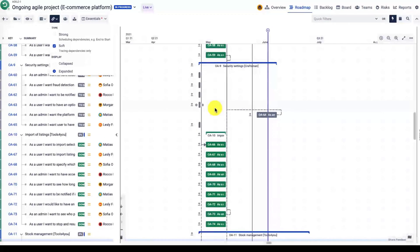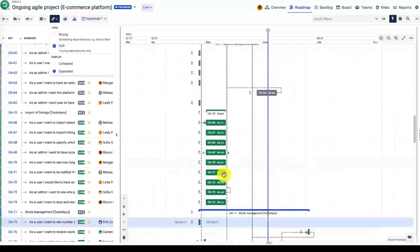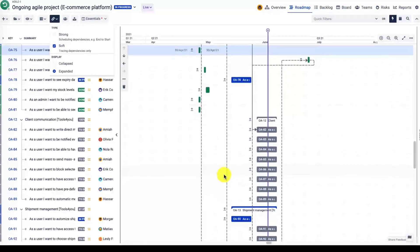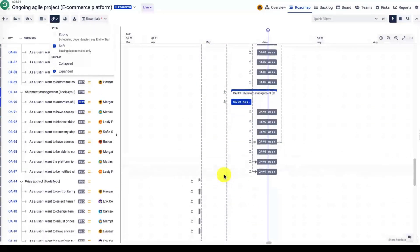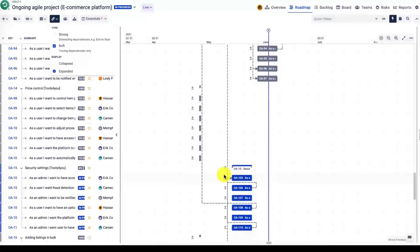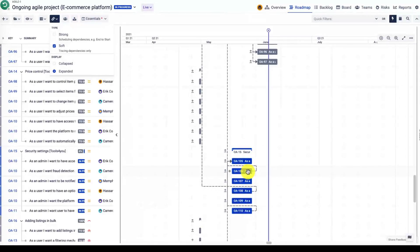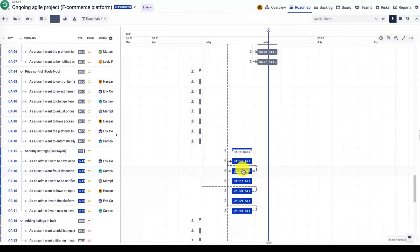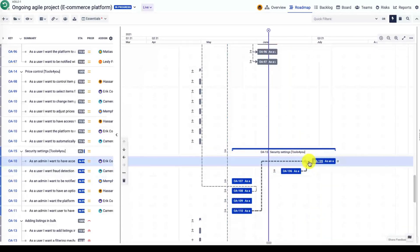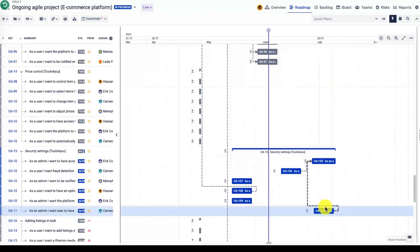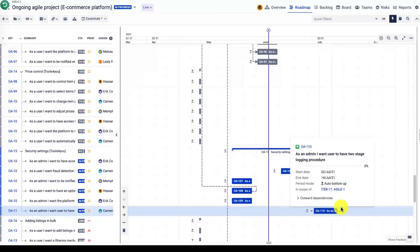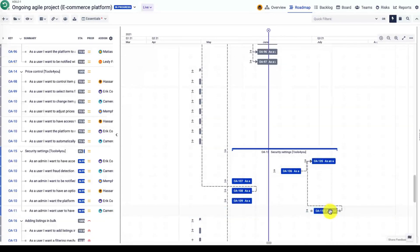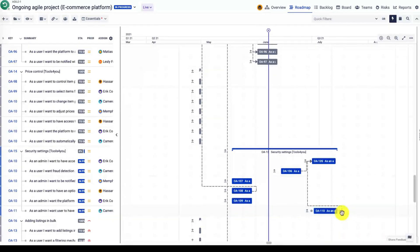If I create a soft link, this type of link does not have a scheduling impact, so as you can see here, nothing happens. It's the opposite compared to the board module—the soft links are drawn as the dashed line and the strong links with scheduling impact are indicated with the solid line.